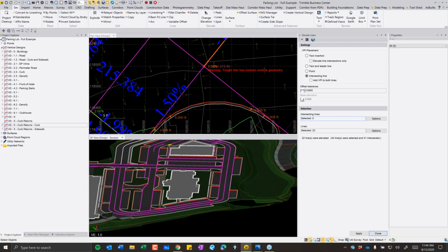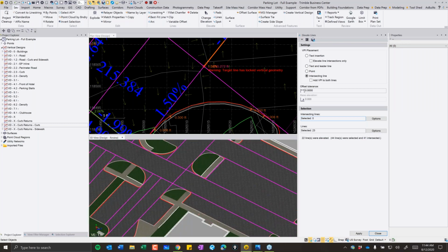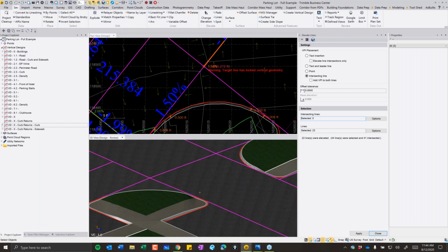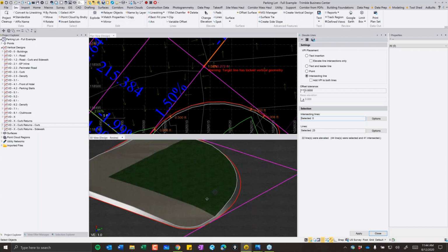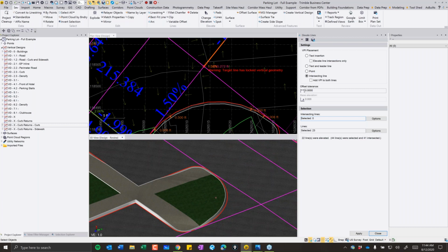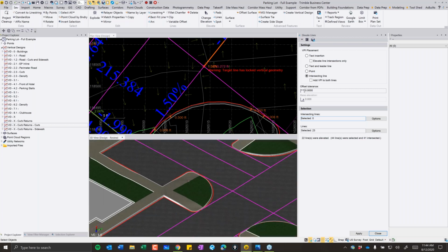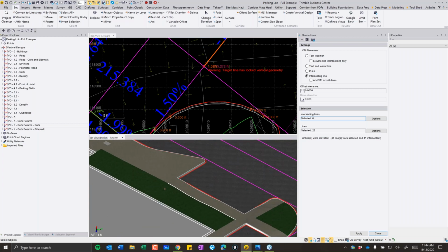But in regard to the texture, the reason I add the texture is for a few reasons. One, for project management, being able to visualize this and walk it through with an engineer. If we're trying to discuss an area of interest, it makes it a little easier to visualize versus a model that might just have the elevation color turned on. This tends to be a little bit easier on the eyes. Also for Sightvision. And also because now these aren't just textures, I can actually apply my subgrades in there. So if I wanted to run a cut and fill analysis, I have subgrades associated to this. So now you really get an all-encompassing model that has estimating data built into it. It's got project management data built into it. You can send all this data out into the field.